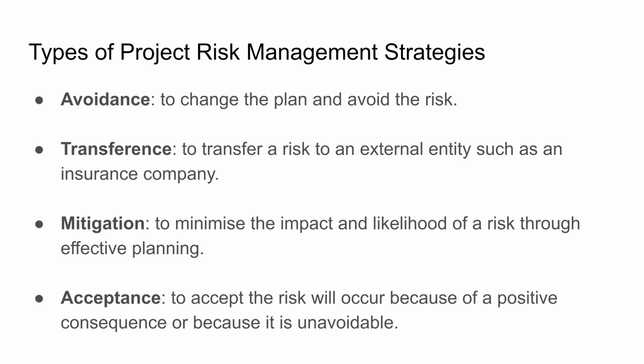Issues can be avoided entirely by incorporating planning changes ahead of time. This is suitable for issues that are quite likely to occur. Risk can be transferred to an external entity, such as an insurance company. This is suitable where the cost of transference is less than the cost of redesigning the project.